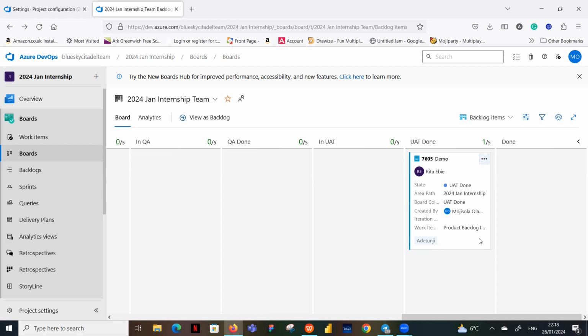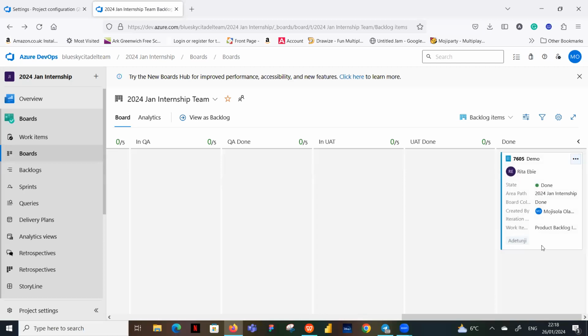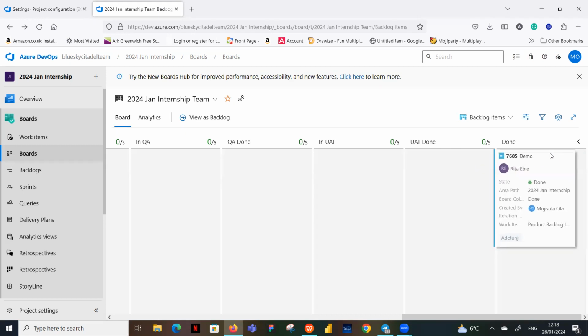So normally why a Scrum Master is advisable, it's best practice, let me just put it that way, for you to check that everything concerning the story has been properly worked on before it goes to done. You want to check that 3/4. So if you allow your BA to take it to done, once she's finished with her UAT, it's not her responsibility to ensure that all the tasks on it are done. She just moves. If that's what you arranged for the BA, to finish UAT and then move it to done, she just moves it to done. But hey, remember, you have 3/4.